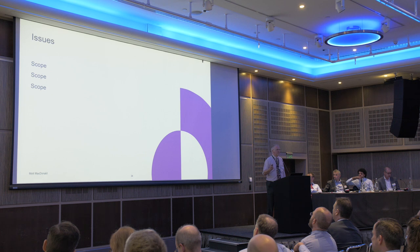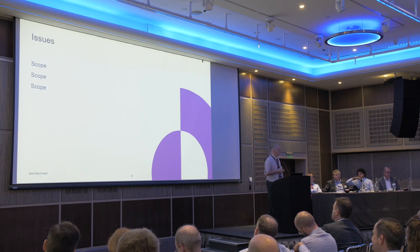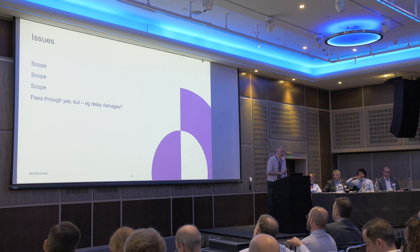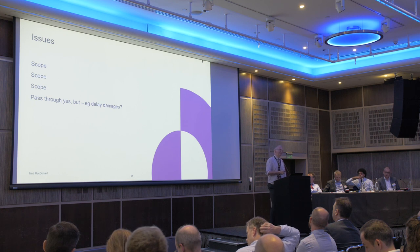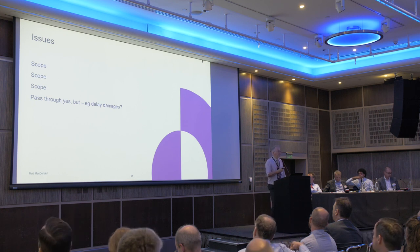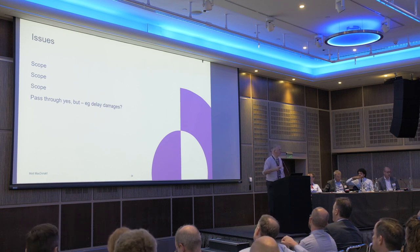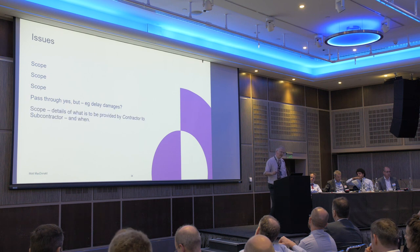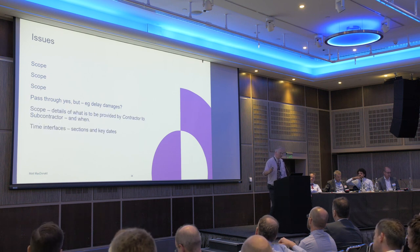What causes problems on all contracts? Scope, scope, scope. Contractors need to realise they are writing contracts — their people need to understand how to write scope. Usual problem: if the contractor has a significant delay damage, can you really pass that through onto all your little subbies, even though those little subbies might well be on the critical path? Is that going to stack up?